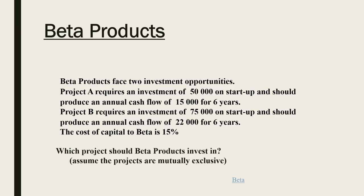Here's a problem for you. Beta products have got two investment opportunities. Project A requires an upfront investment of 50,000 and then produces annual cash flows of 15,000 for six years. Project B requires an investment of 75,000 and produces annual cash flows of 22,000 for six years as well. If the cost of capital, that's the discount rate, is 15%, which project should they invest in?